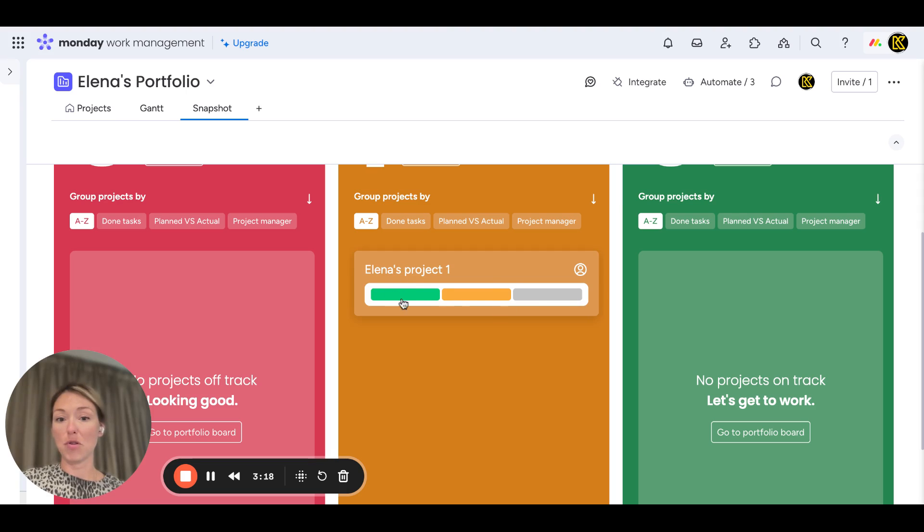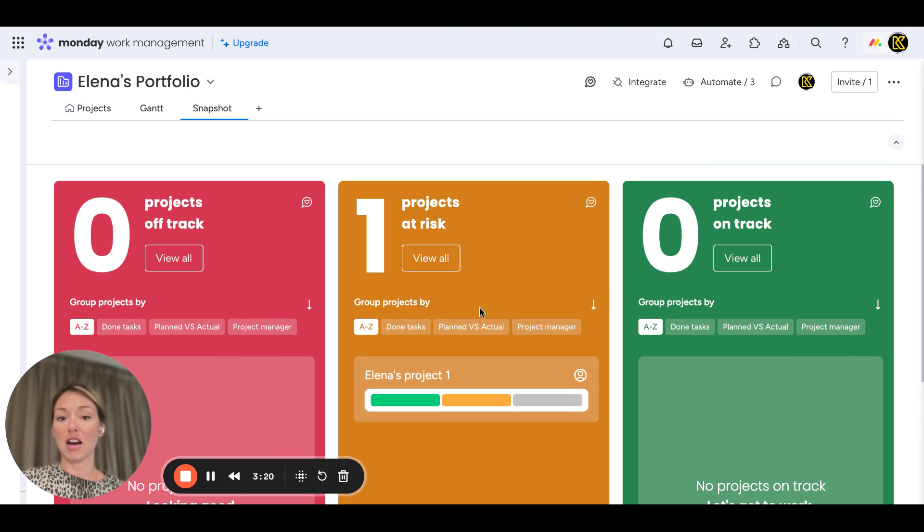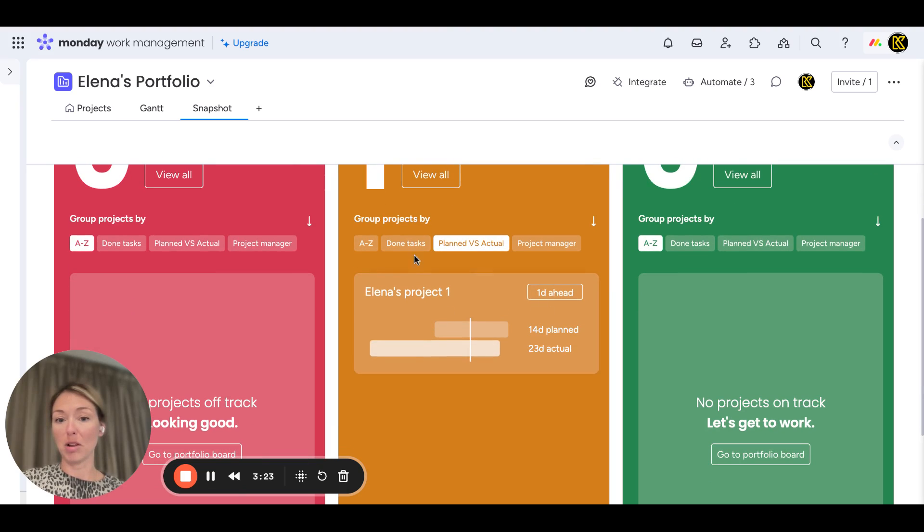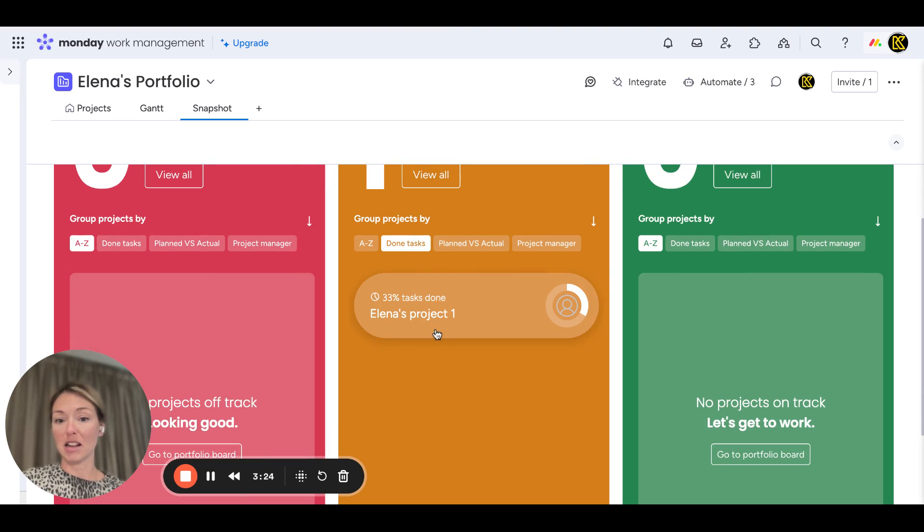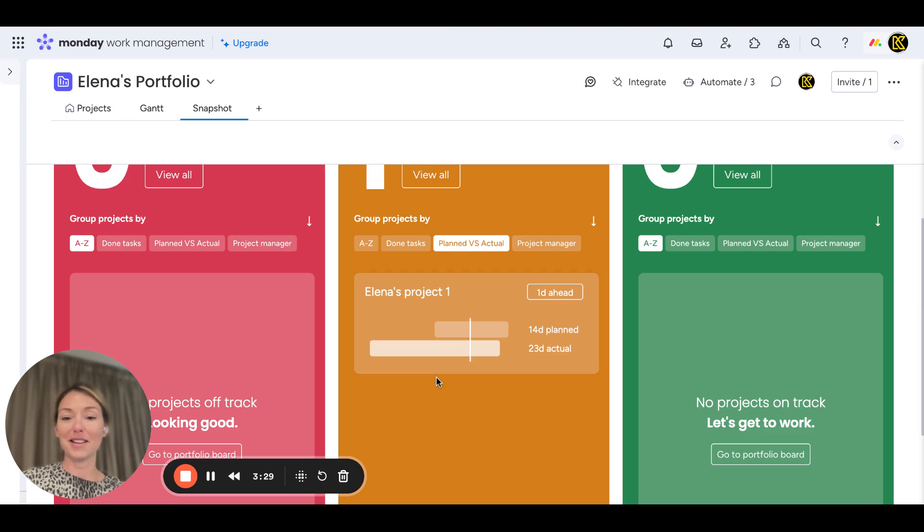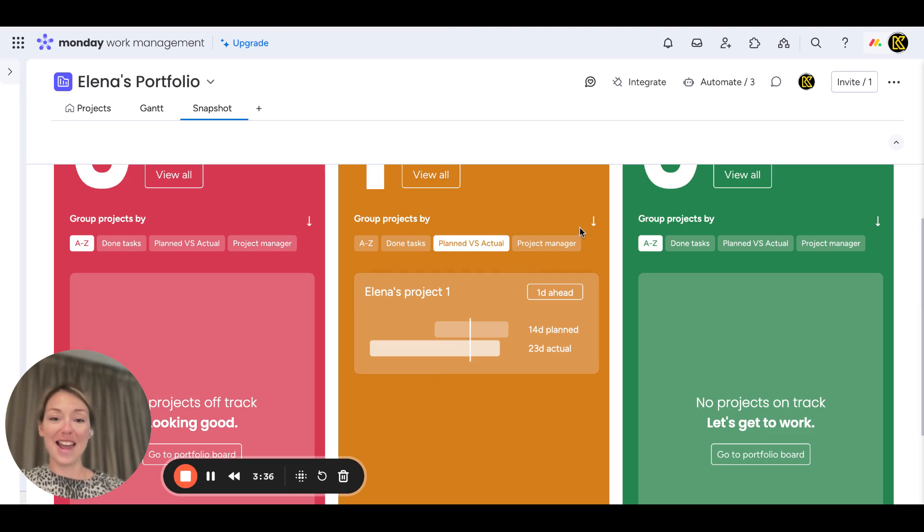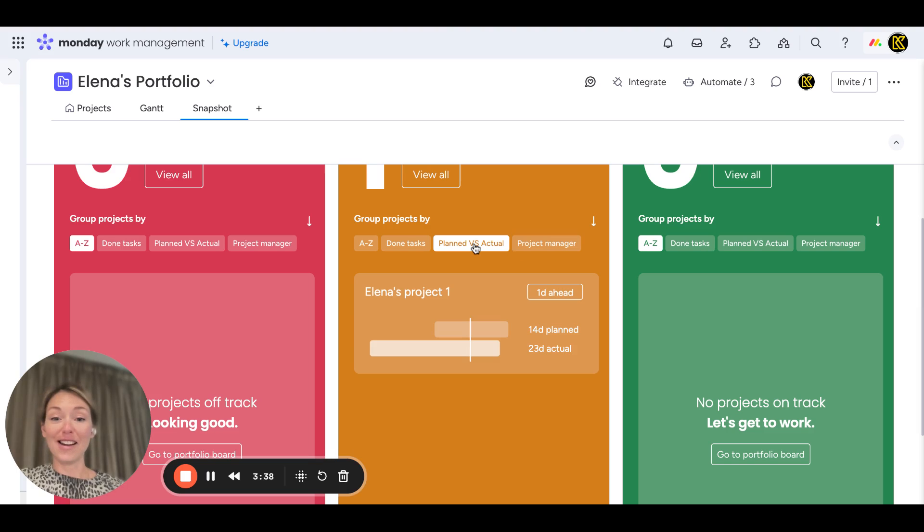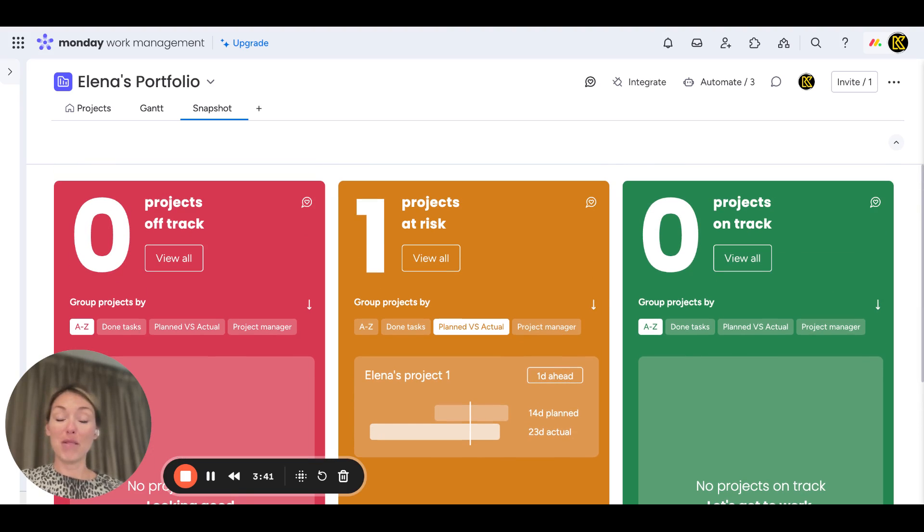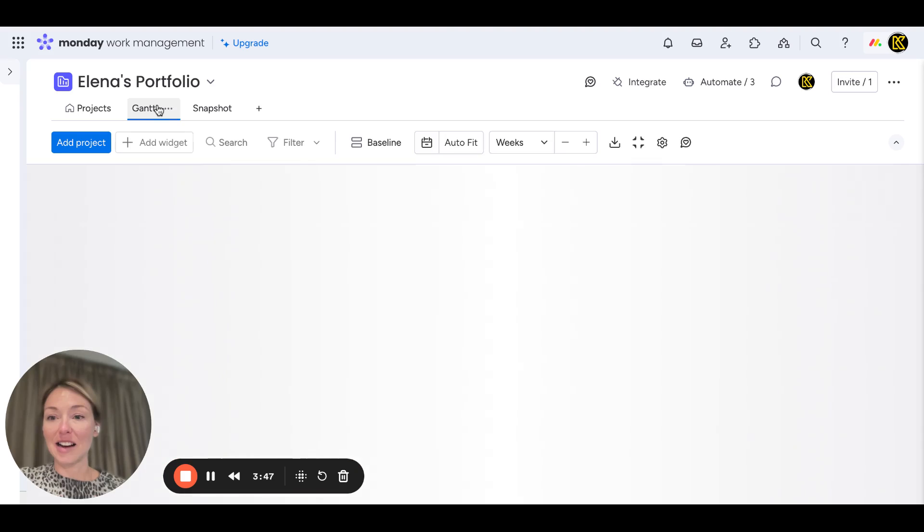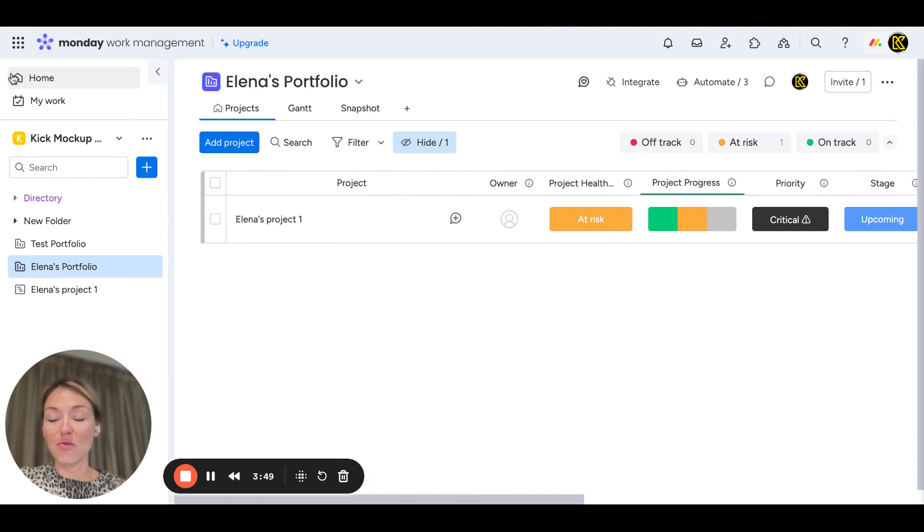You can see their progress—that's our project. You can then see the timelines, number of done tasks. This was one of the most exciting things we've been told about at Elevate last year when the product roadmap for this year was announced. I won't lie, it blows my mind right now. Here you go: 14 days planned to 23 actual days.